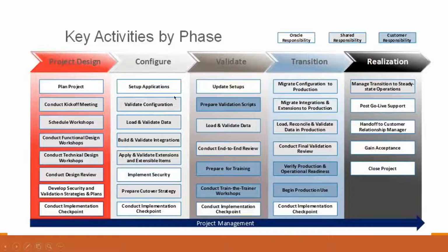If they say that we need to have every quarter an adjustment, and I don't document it and go ahead and do the setup, then when we show it in the system, during UAT they say, no, no, no, we said only one. How come you have defined 4 adjustment periods? So for that reason, whatever we discuss, we capture, we take a sign off, and there is a naming convention. I will come to that slide. Based on that only, we start doing the setup.